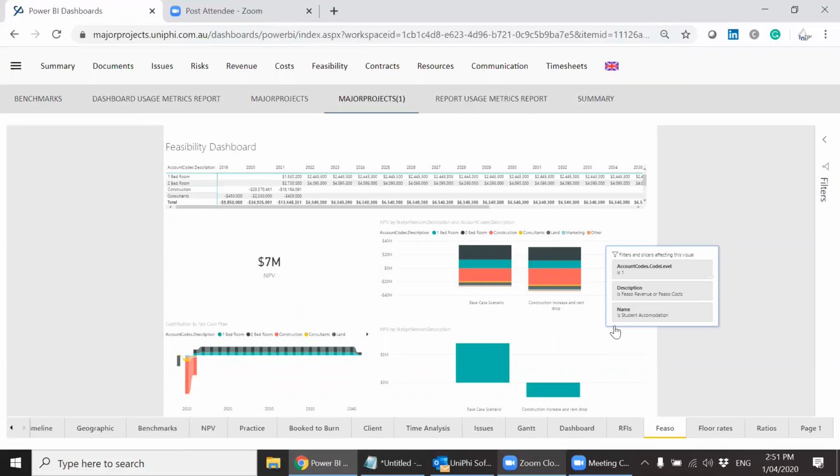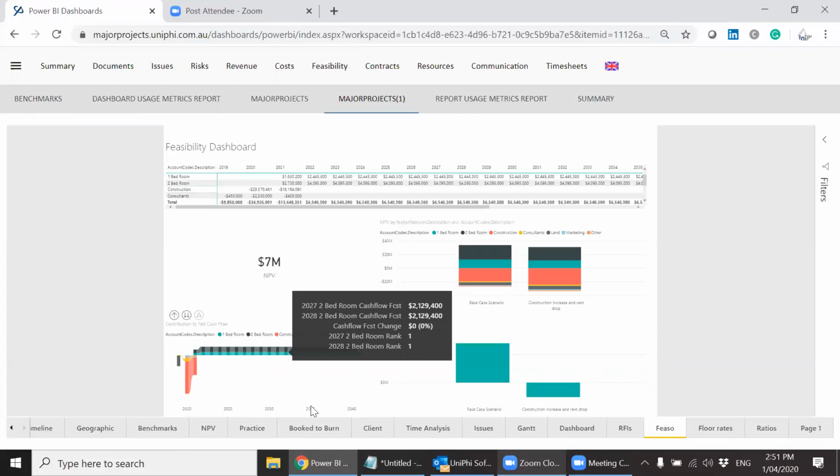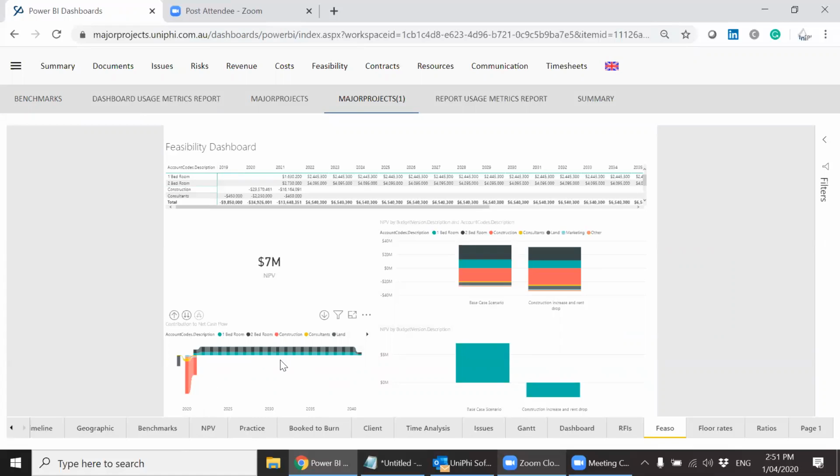So, that data is there on the page. You can see this profiles, I mean, aged care is crazy because of the timeline, but this profiles the spend. So this is the land purchase. This is the construction purchase, like building the asset. And then this is your revenue profile afterwards, which is a rental sort of revenue profile coming in there. And, that would be more useful, I imagine, on a product development type NPV or something like that, where you can see the S-curves and work out whether that's a valid ramp up of your product, whether it's going to go viral or not, pardon the pun. But yeah, so that capability and even this dashboard is entirely open to the end user to change and build and create what they want.